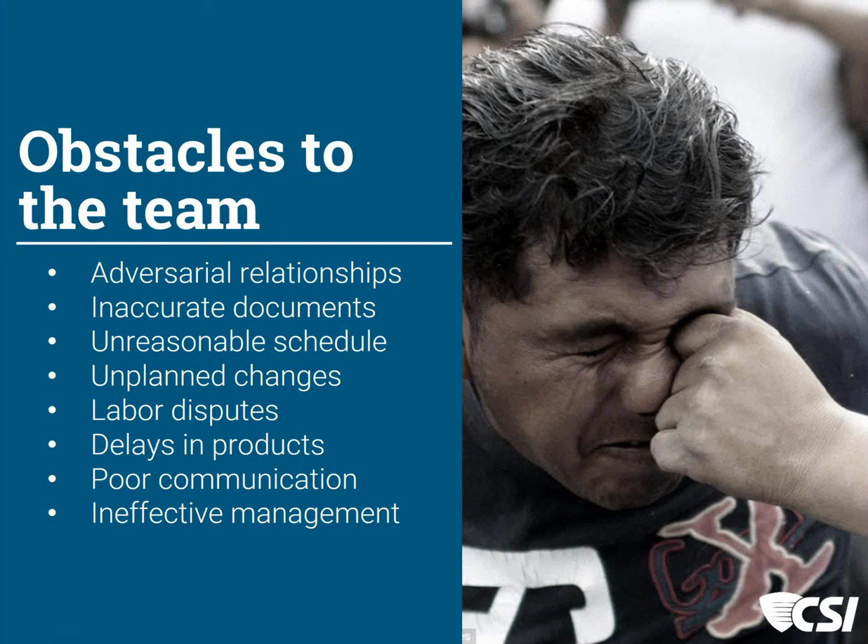Those kinds of things can delay the project, as well as something that happens with products, either in manufacturing. There have been times in the past where, I am based in North Carolina, we go through sheetrock shortages, drywall shortages, for example. So that can be an obstacle to an effective and successful delivery of a project.